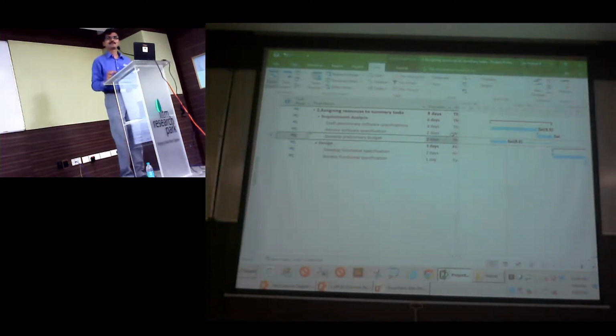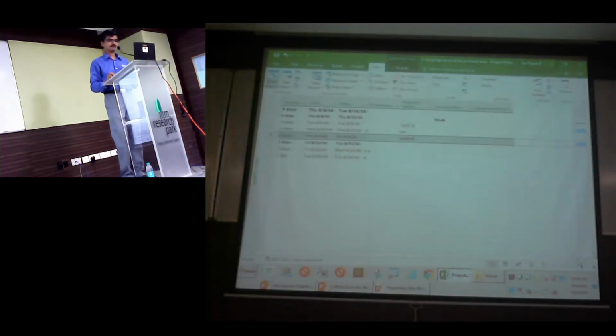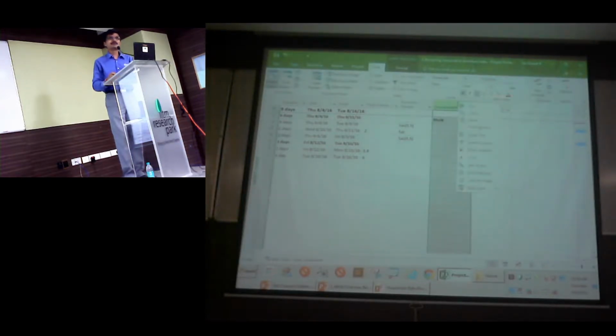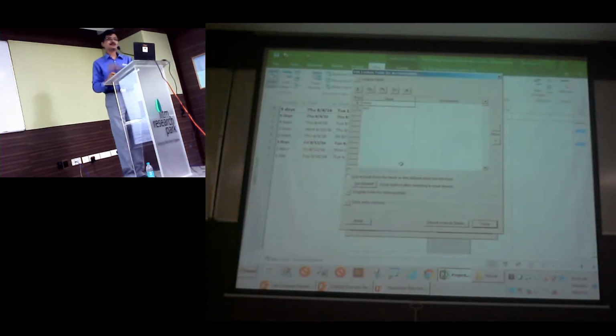In the accountability, you mentioned the resource name is there. Can I include it again, in some mark I can add a size? Yeah, you can, but you should manually customize it and do it. Will overallocation come? No. Accountability, there is no overallocation. Accountability is only for supervision. The text field, what you see here is not even a resource name. It is just a text field. This is the additional field, so nothing gets validated. Text one has been specifically created for accountability, just for reporting. This is an additional field.